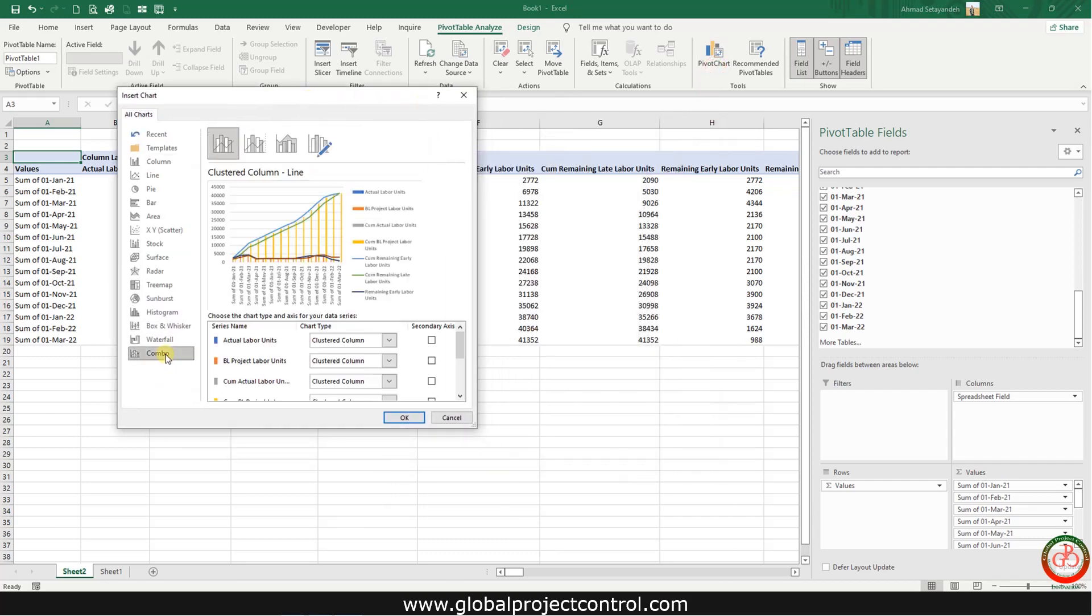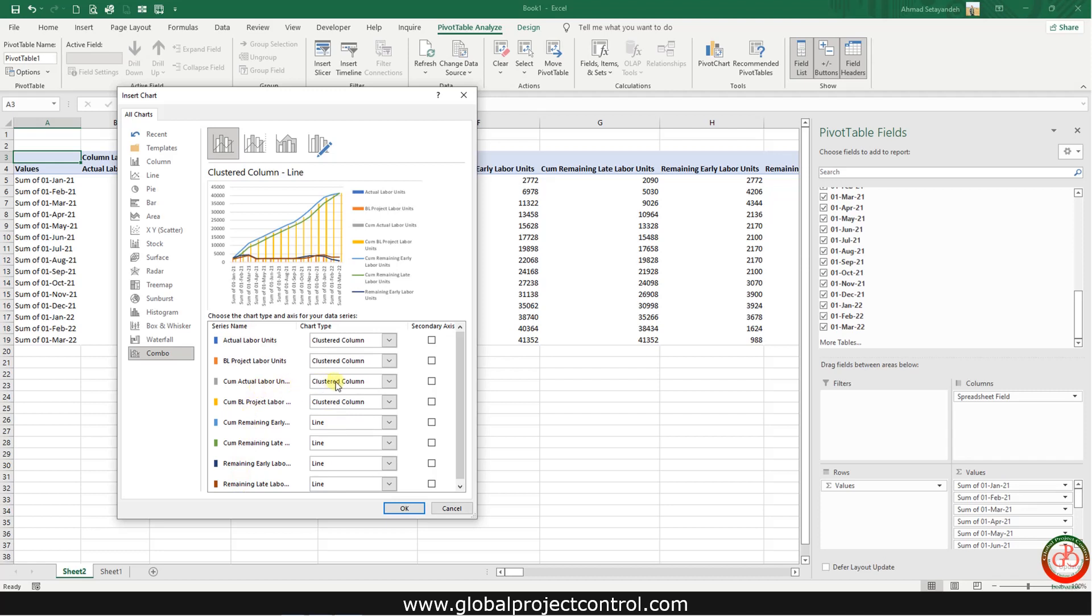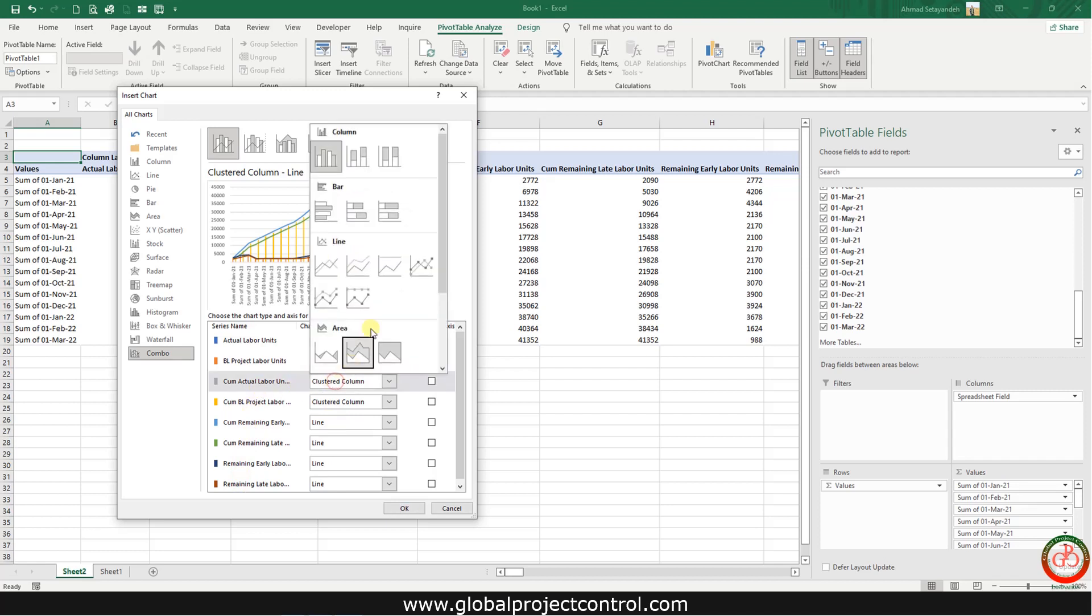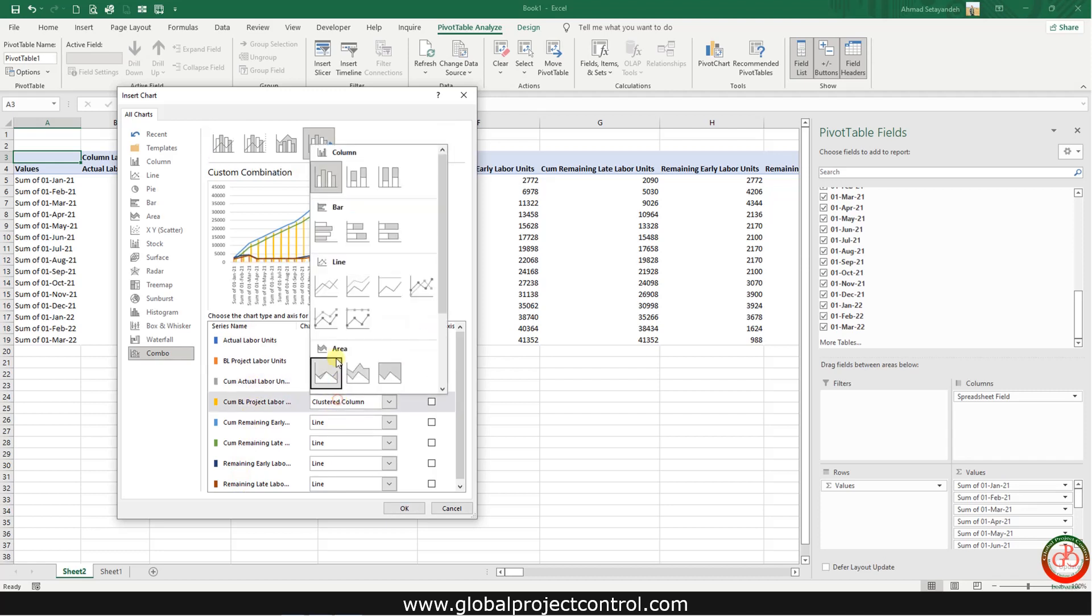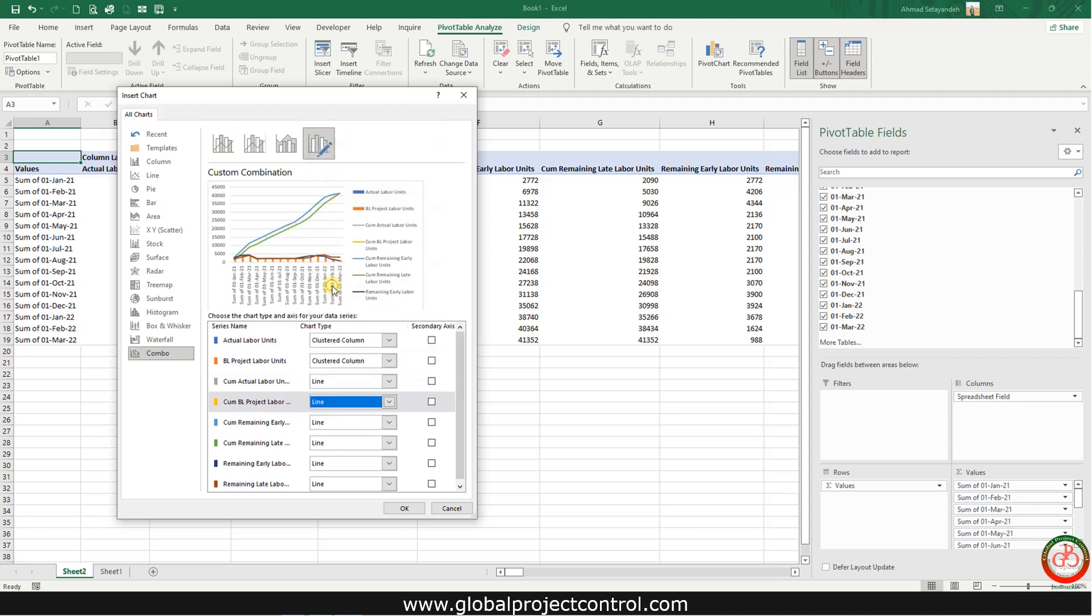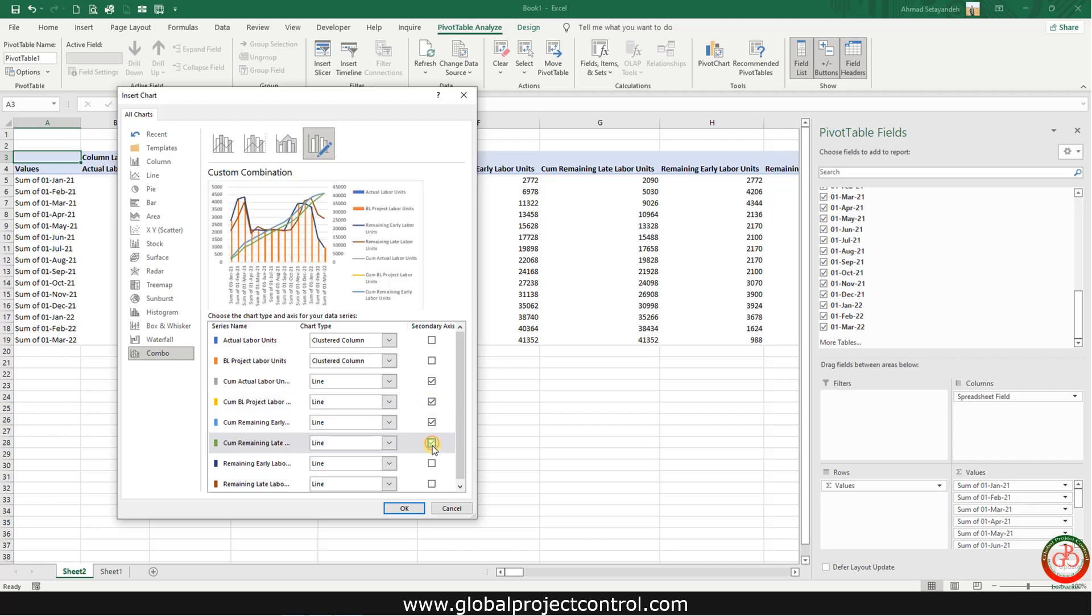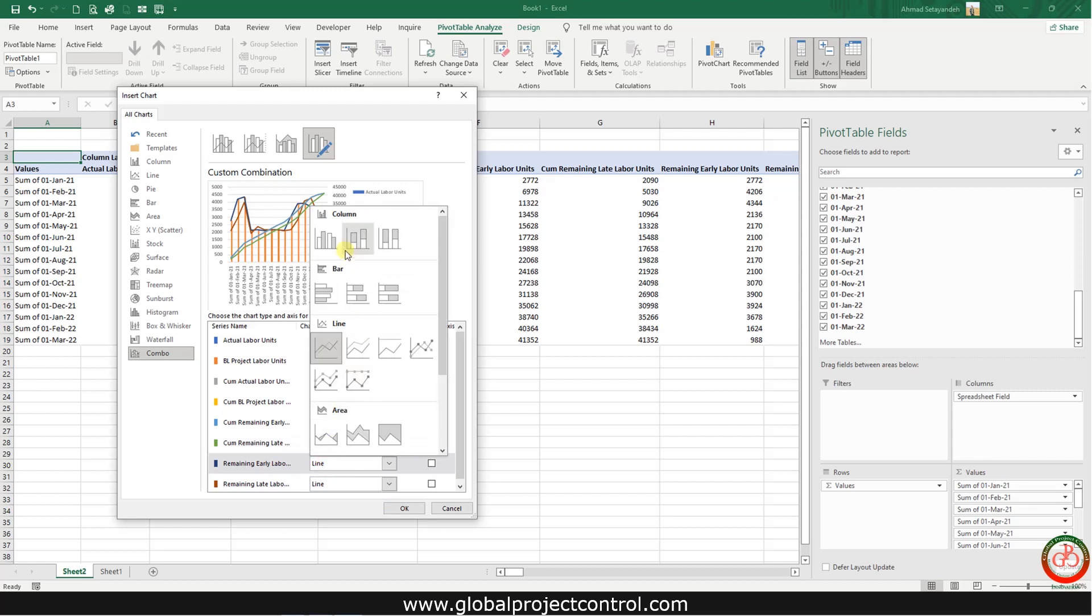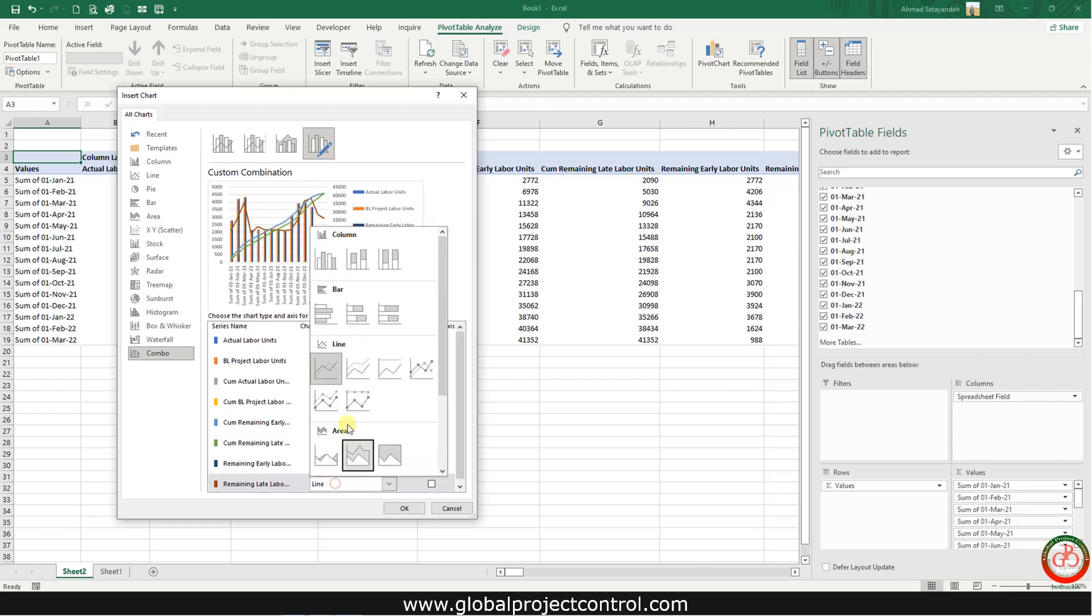Select combo section. You have two types of chart: first clustered column and cumulative information. All the cumulative should be changed to the line or line with marker and be the secondary curve on this chart, and all the monthly information should be changed to the clustered column.